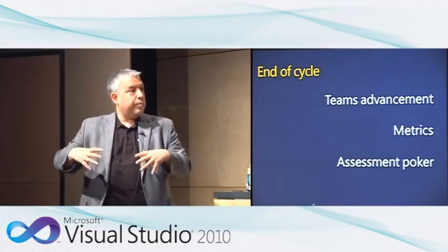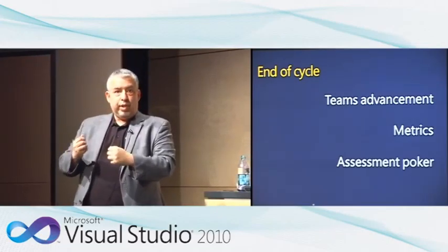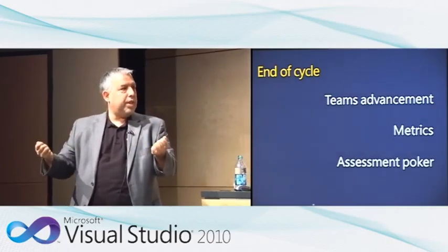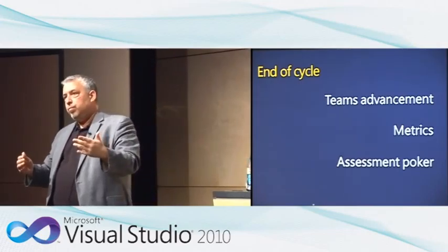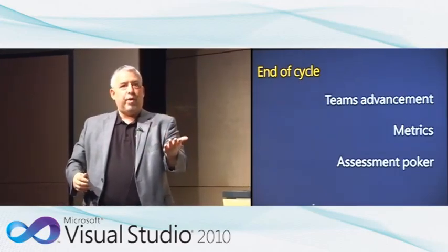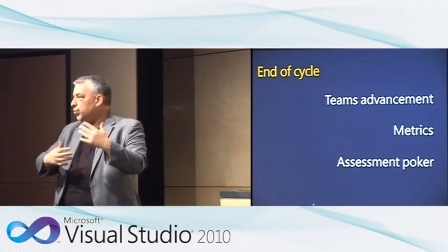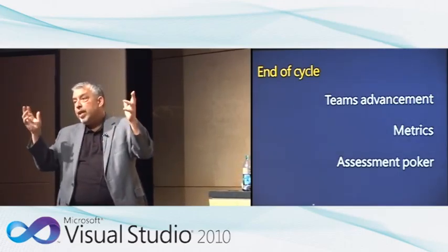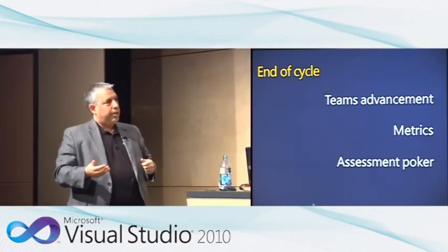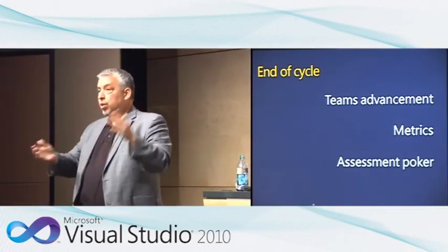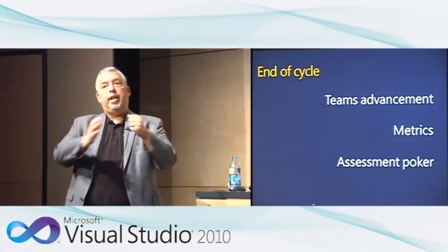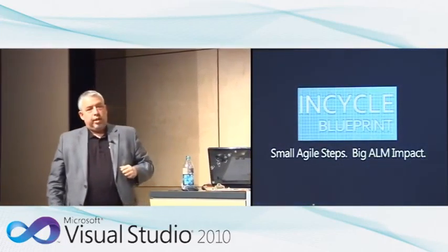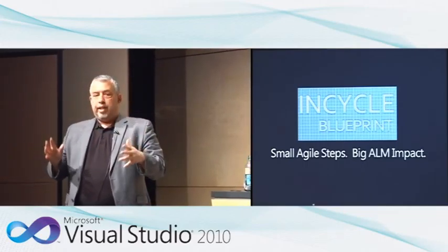We bring key people from the team or the teams, and we identify the characteristics of each of the maturity levels. Then we take a practice and everybody flips their card on whether they're level 1, 2, 3, or 4. Then we go from the lowest, justify why they think it's the lowest, then the highest, and we go through them using the Scrum approach of doing estimation. We're estimating our level of maturity, and then we can compare where we are versus where we were, and see if we actually had good advancement from an improvement perspective. So that's kind of the principle of how we've done that.